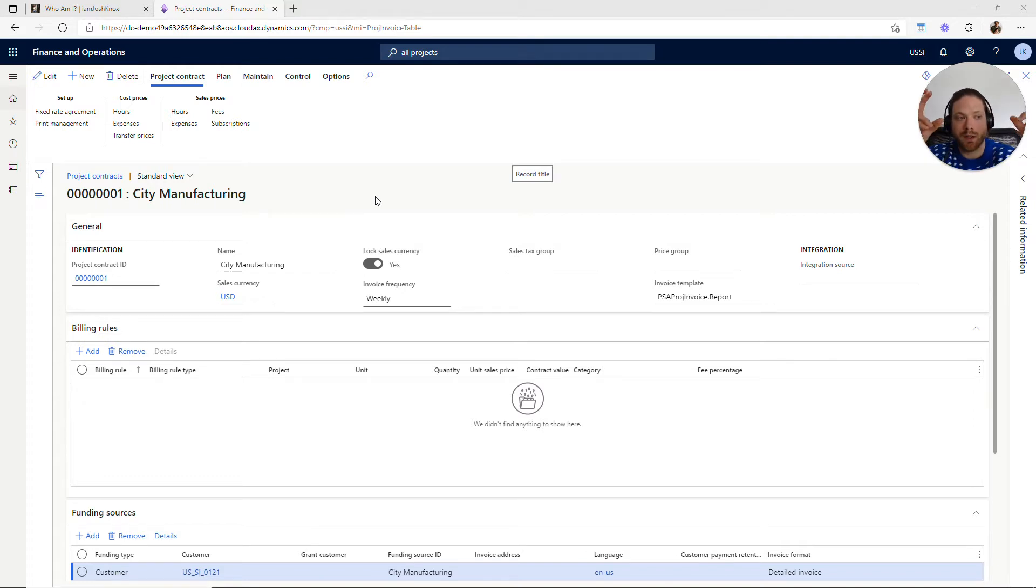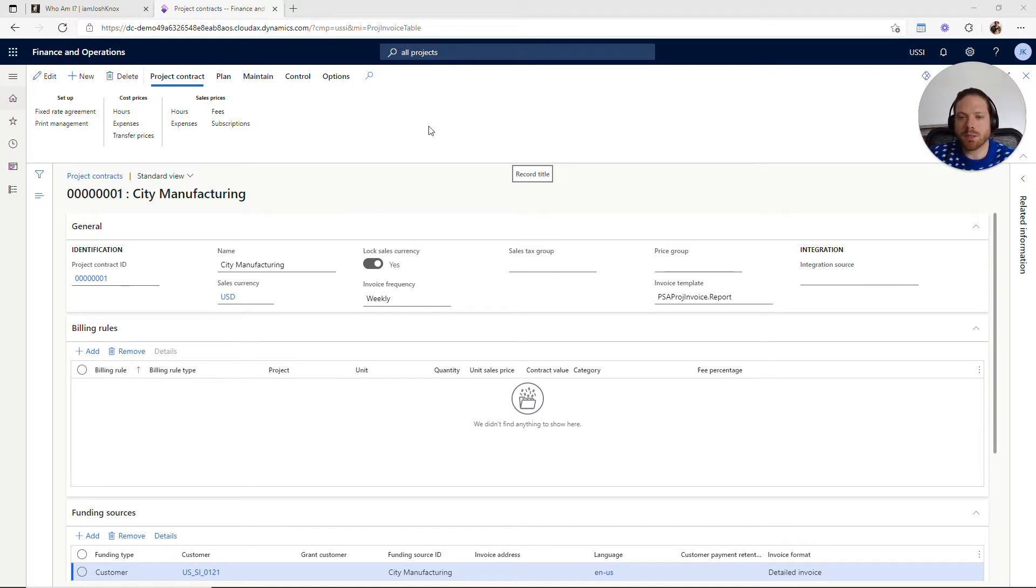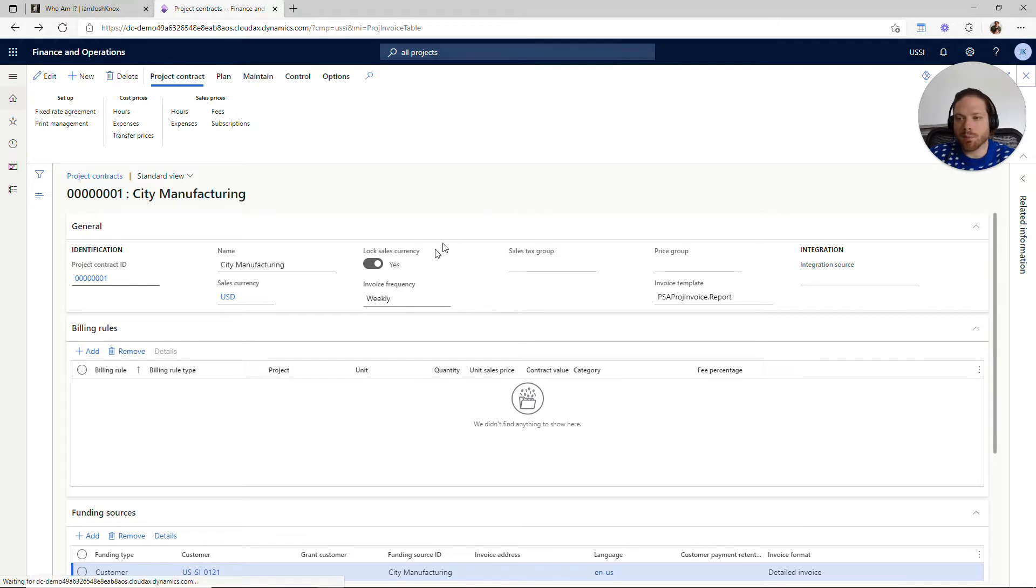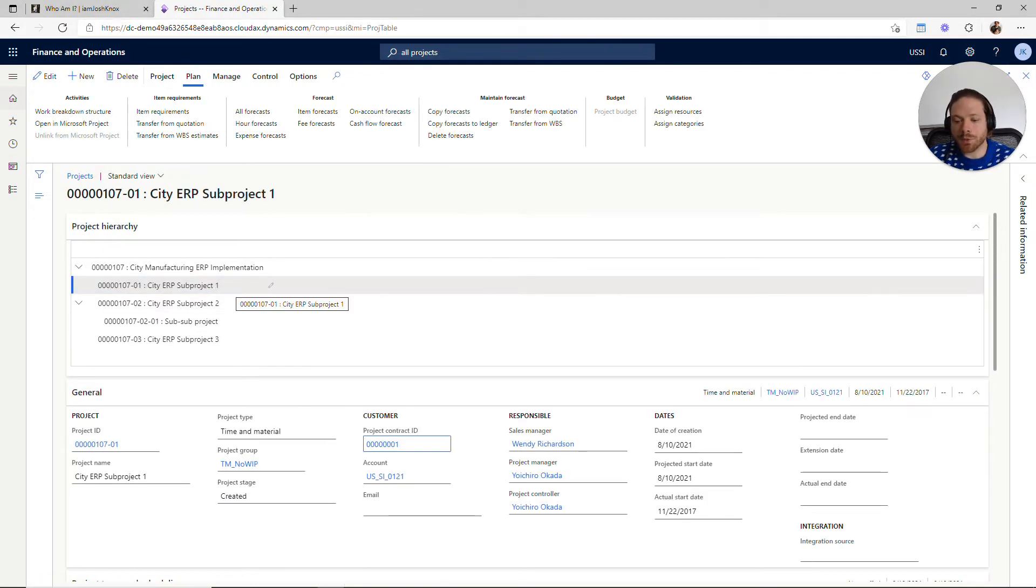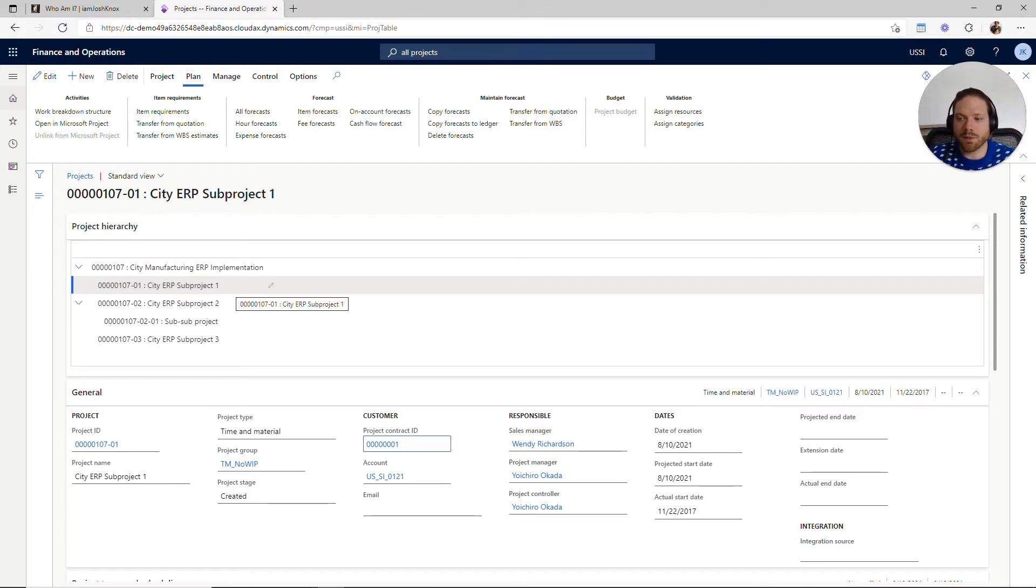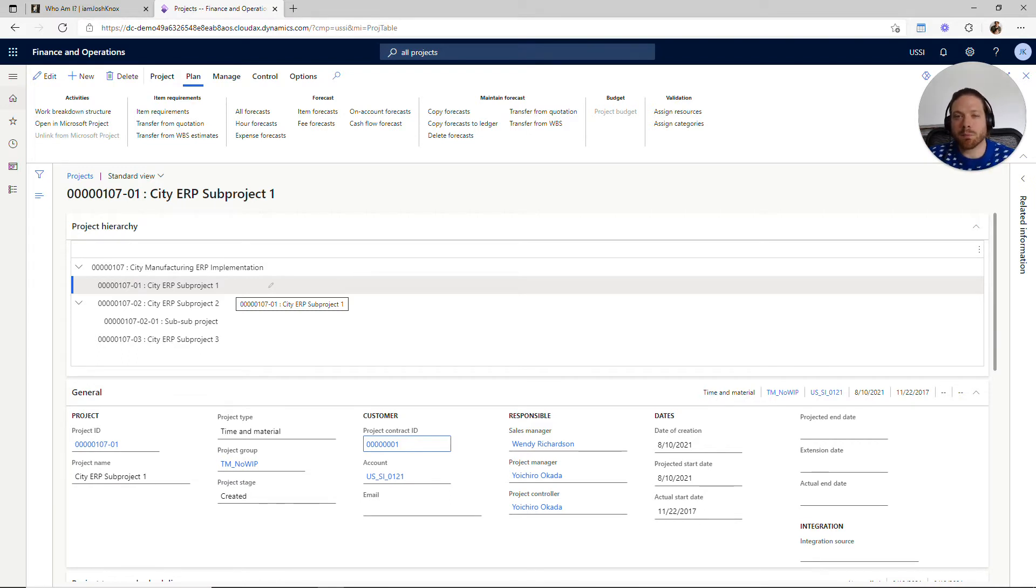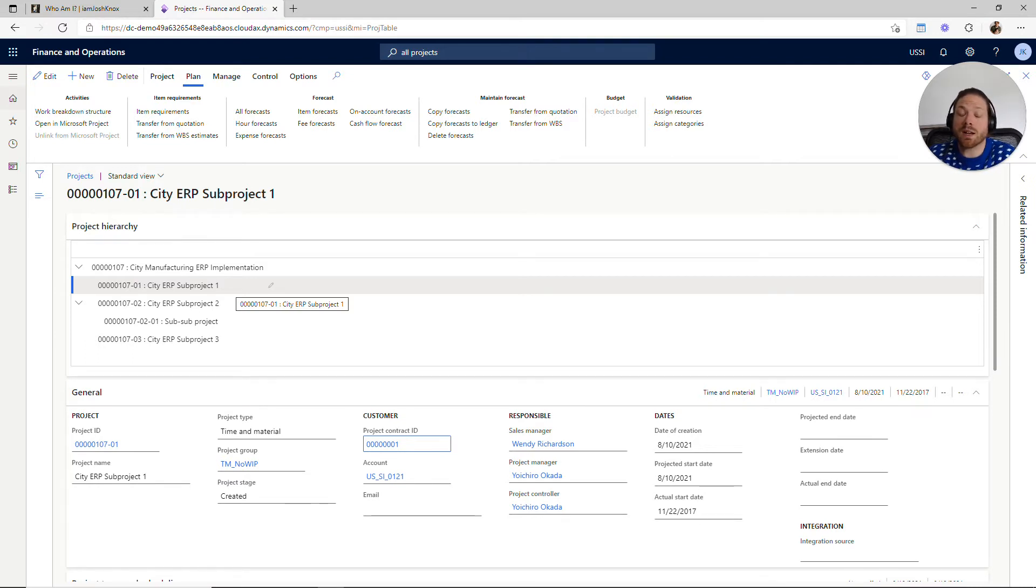So you have one project contract, multiple projects can be associated to that contract. Then underneath a project contract you can have multiple sub-projects, maybe for the purpose of breaking down the project into different ways. Maybe those different sub-projects are part of different project groups because you need to post revenue to different accounts or you need to recognize revenue in different ways—that's something that you can use with sub-projects.